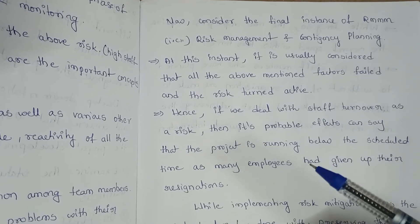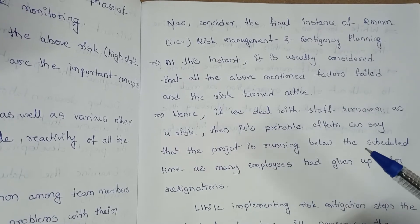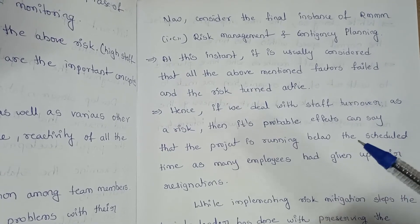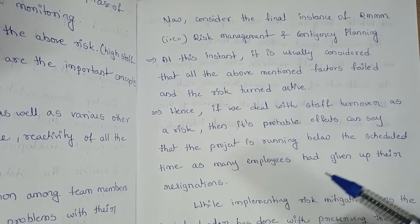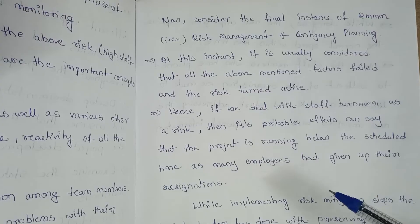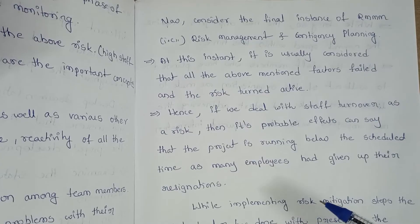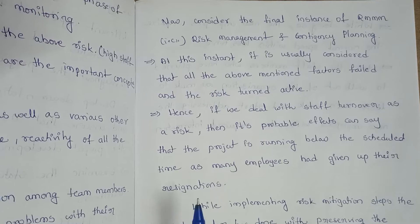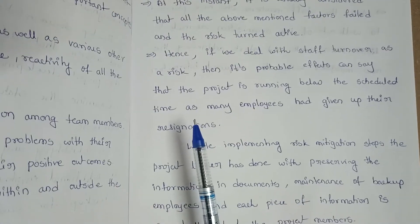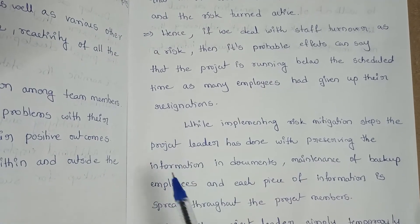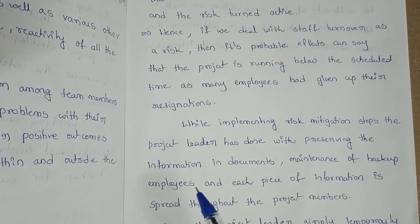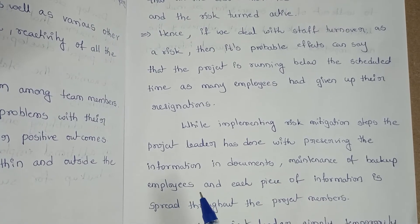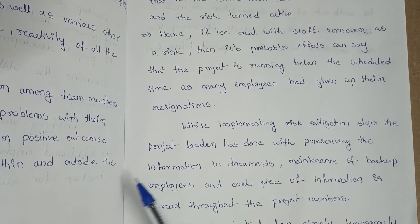It is usually considered that all the above-mentioned factors fail — that is, risk mitigation and monitoring fail — and the risk turns active. If we deal with staff turnover as a risk, its probable effect is that the project is running below the scheduled time as many employees have submitted their resignations. While implementing the risk mitigation steps, the project leader has already documented information, maintained backup employees, and spread each piece of information throughout the project members.